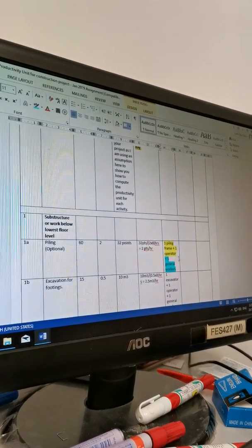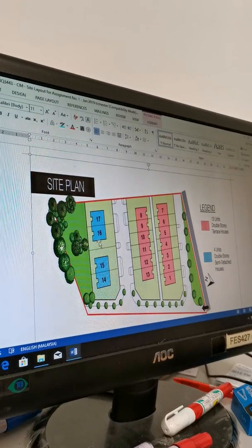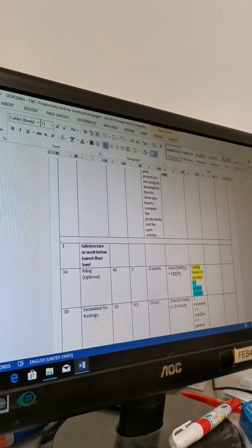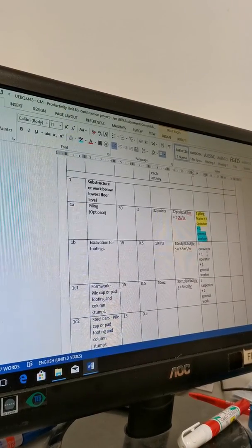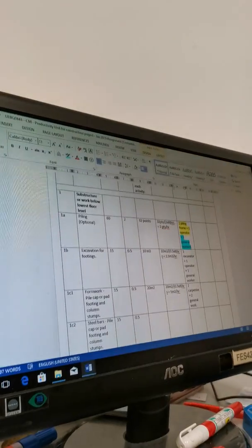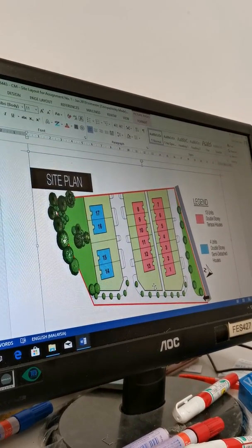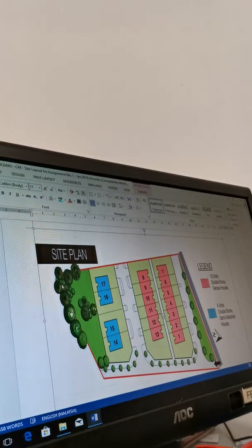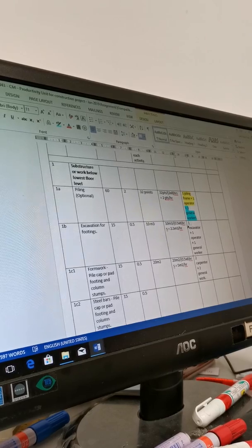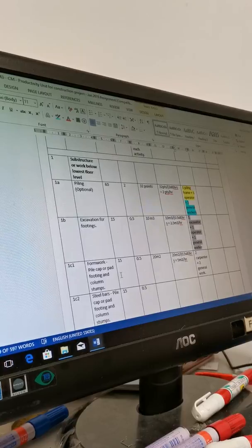Let's say now, if I see this diagram, this I say is 1 machine, 1 piling, 2 and 3 here. So this figure here I will times 3. But all these, like this excavation one. Even excavation, with the machine, more often than not you cannot have 17 excavators working in this small area. So same case: 1 excavator working, 2 and 3 excavators working. So on these factors, whatever you put here will be times 3. Now this one is individual already.